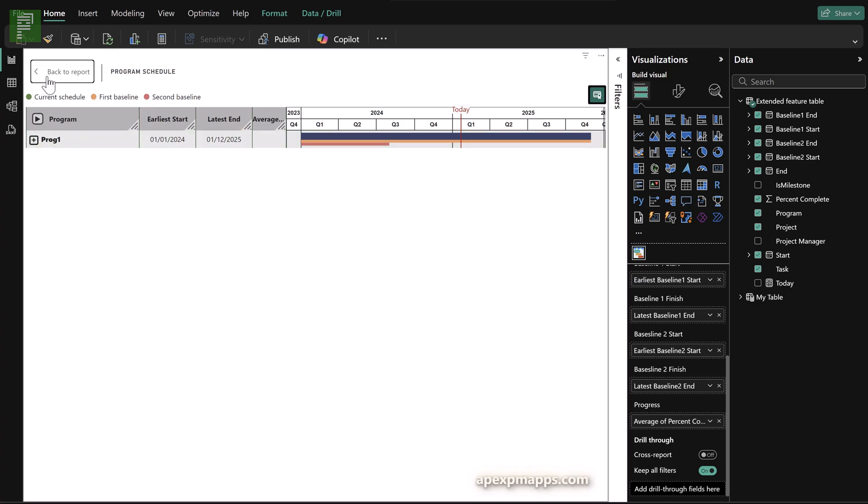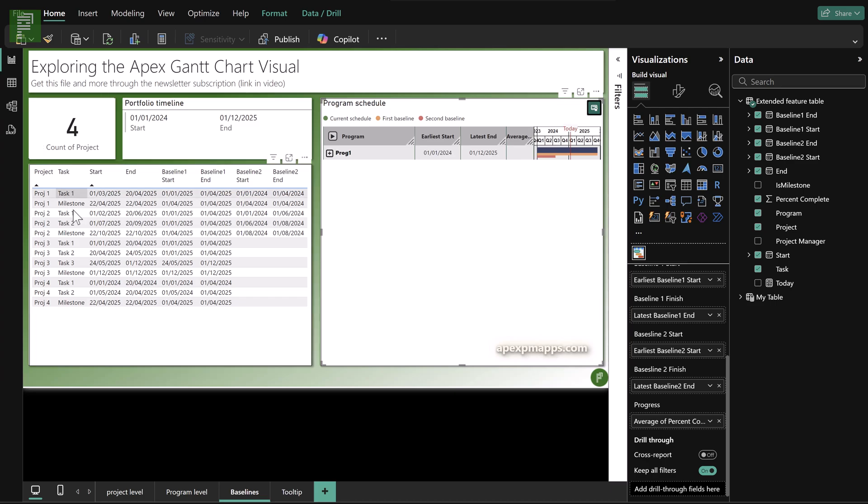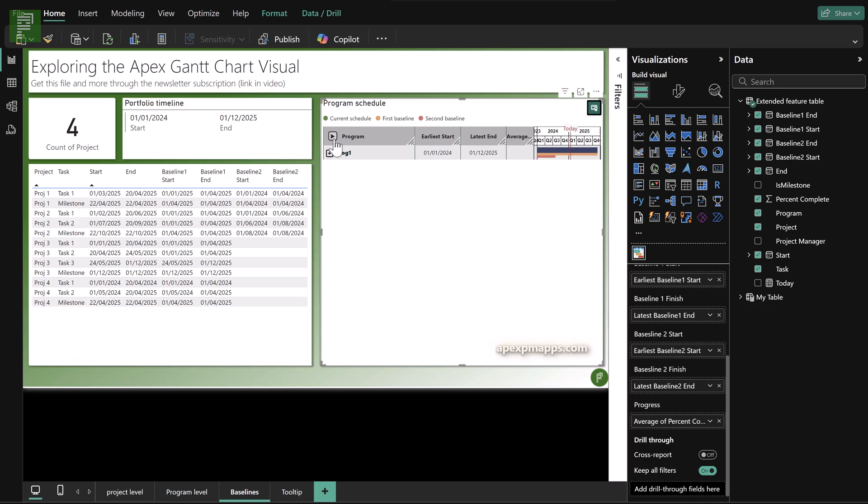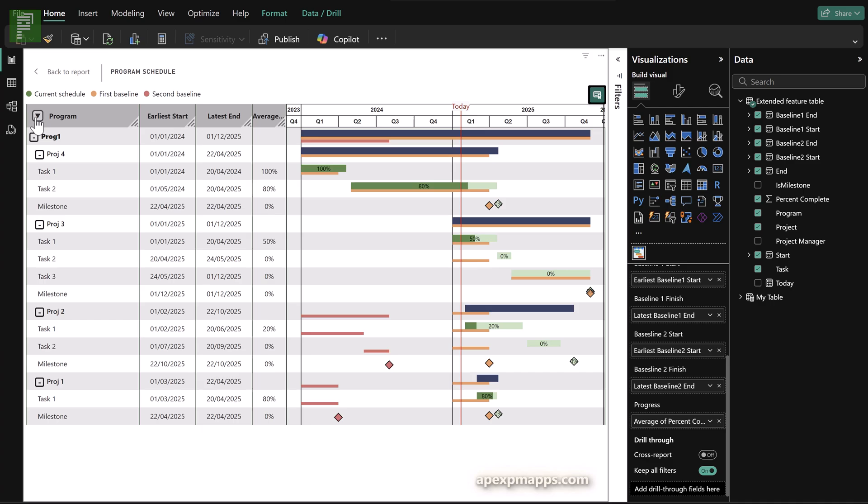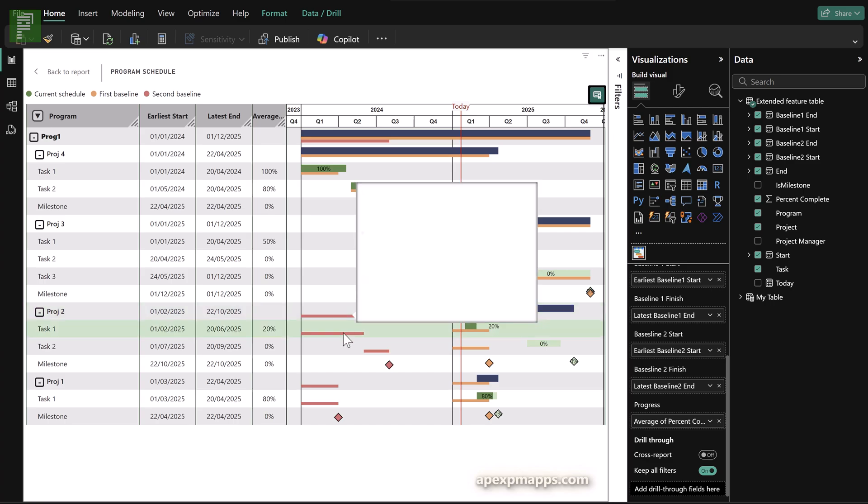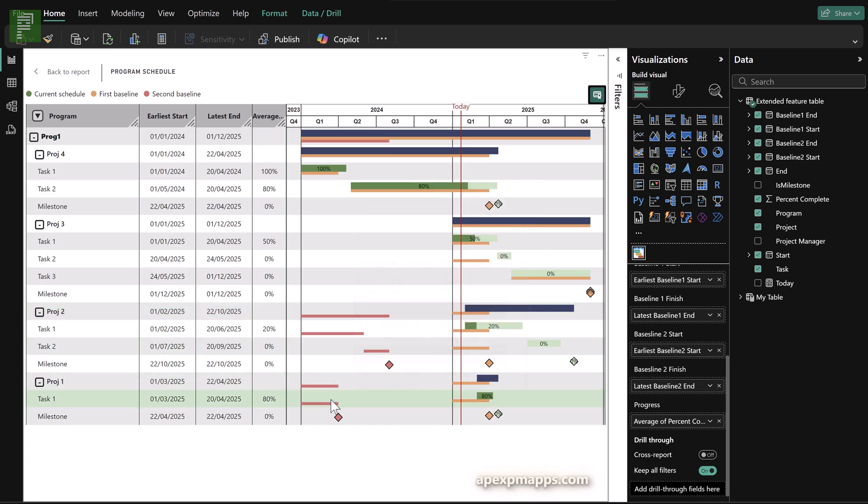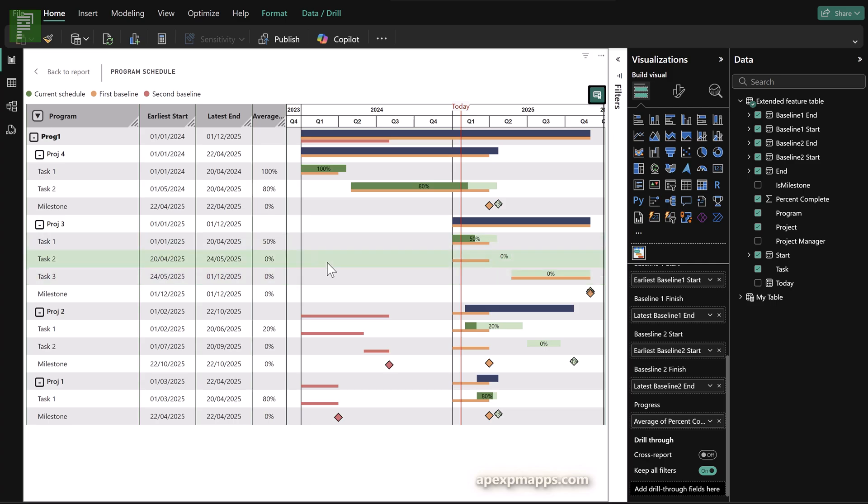Now before we jump into the visual itself, you can see that the baseline one is fully populated, but baseline two only for the first two projects. So that means that we'll want to see baseline two only for those bottom two projects, which is correct, project one and project two. And it's immediately clear what the difference is between project current schedule, baseline and baseline two. So this is a very nice visual.